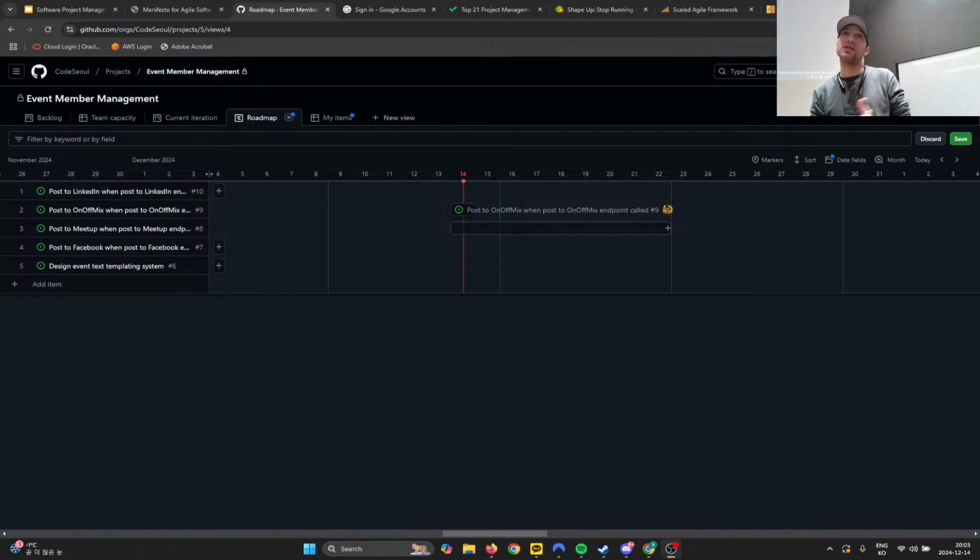So if there's work you have to do, even if you're an engineer and it's not engineering work, make a task for it, okay? Because it takes up time, it takes up effort, it is time and effort you could be spending on something else. So if you have to spend time and effort on it, make a task for it. If it's a 5-minute thing, maybe not. But if it ends up being a conversation you need to have with someone where it's not a quick yes or no answer, make a task for it. And record the decisions, yes.